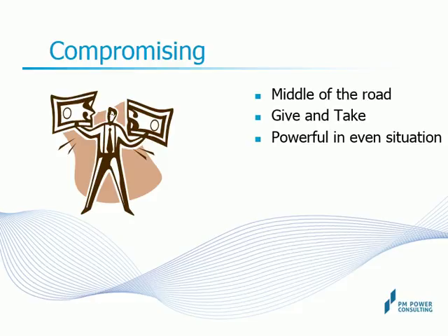An example: customer claims 2 of the software requirements are part of the scope of this release and expects them to be delivered on the agreed date. This is not your understanding, and you as the project manager have not included those in your release plan. After a quick discussion, customer and you reach an agreement for one of the requirements to be included in the release to be delivered on the originally agreed date. Customer loses one of the two requirements that he demanded, and the project manager loses on increase in scope without change in deadline. Both parties have compromised.